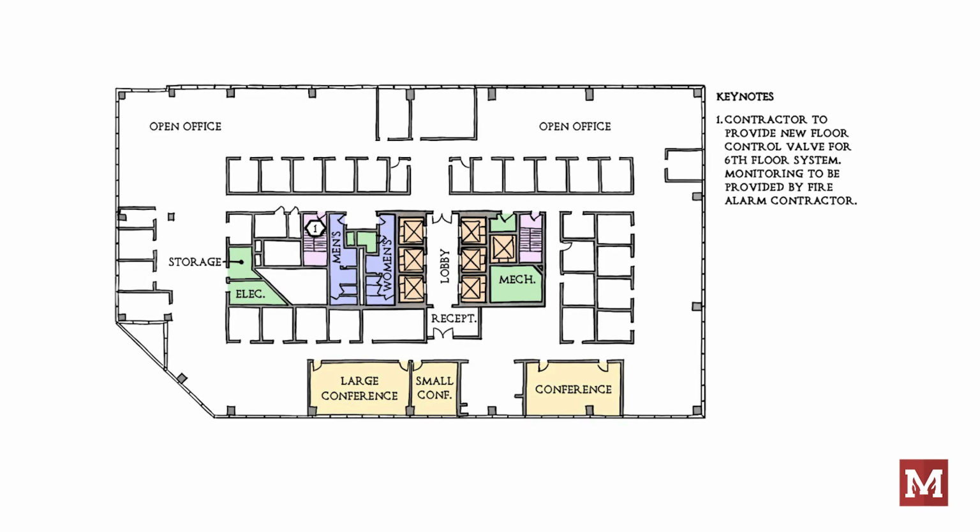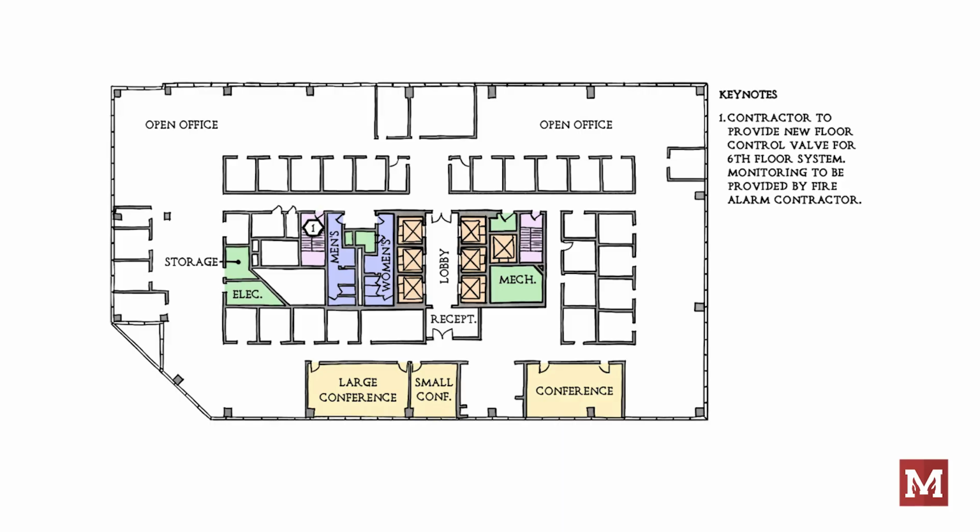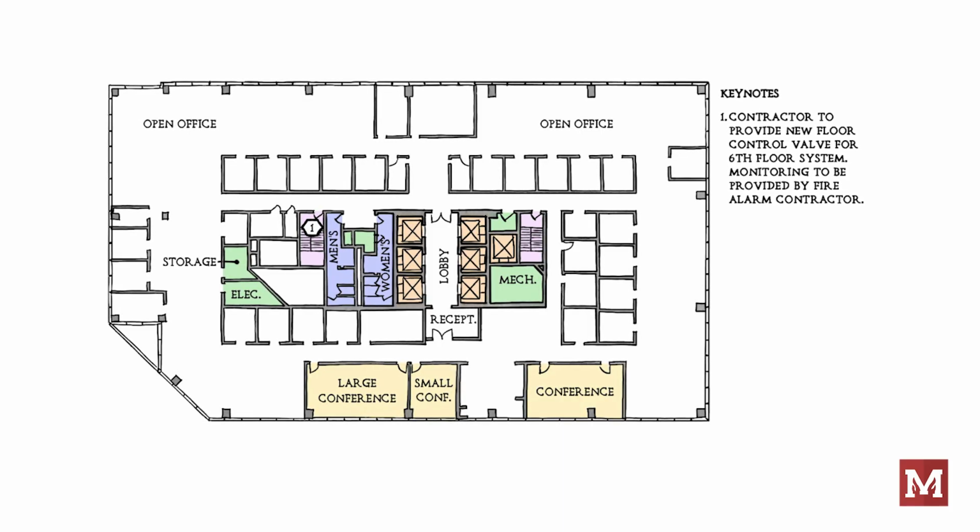If the work is shown on sprinkler plans, it could be inferred that it's their scope of work, but there will naturally be some coordination that has to happen between the sprinkler contractor and the fire alarm contractor, since all valves controlling the water supply need to be monitored by the fire alarm system.